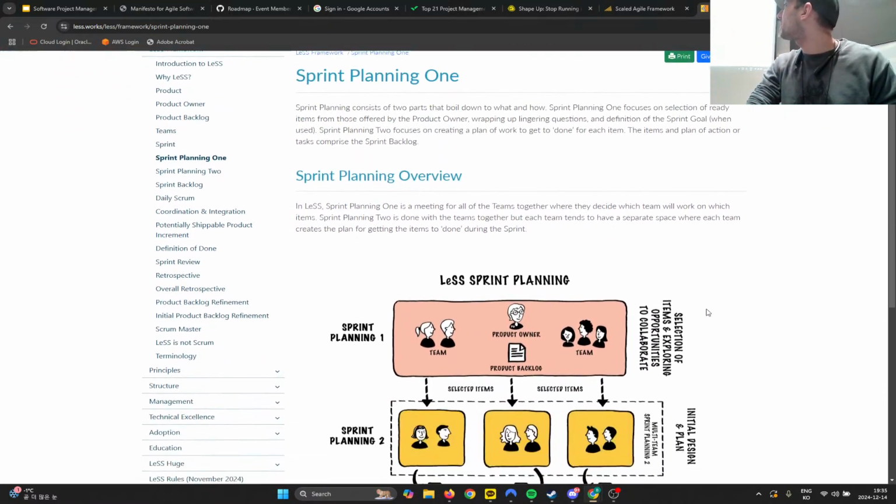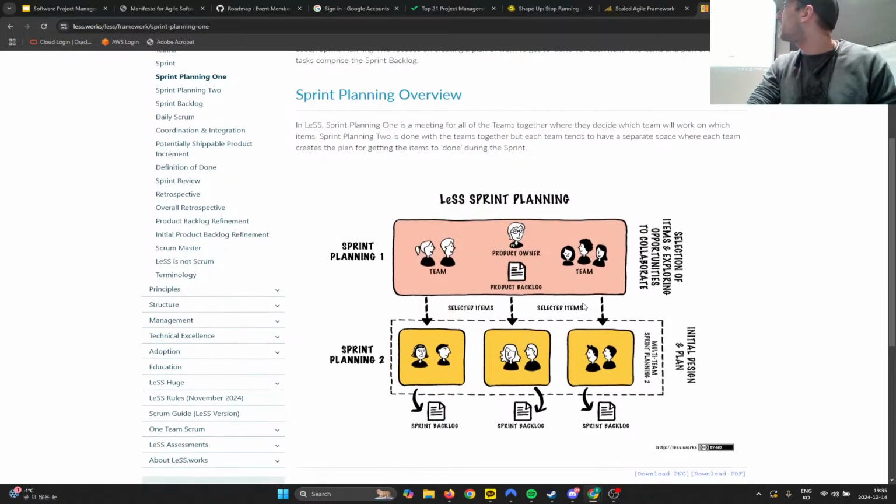Basically, what you have is your planning team doing a sprint, and then your implementation team doing a sprint, effectively, right? So this is requirements collection, requirements definition, open questions generation and answering. And then this is, okay, now that we know what needs to be built, what are the technical tasks going to be? And then what order do we build them in, right? So I think that makes sense for what Alex was saying, where it incorporates not only the engineers, but the broader people around engineering, which is actually what my team's having problems with now. So yeah, that makes sense.